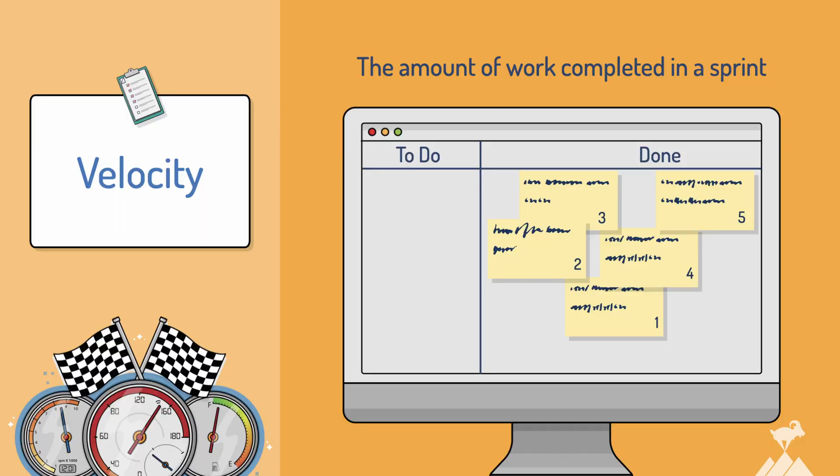Calculating velocity is straightforward. Add up the estimates assigned to each product backlog item that has been completed during the sprint or iteration. For example, if a team completes five backlog items in a sprint and they're estimated at 3, 5, 2, 4, and 1 points, the velocity for that sprint would be 15.